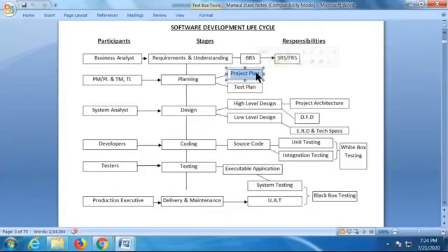Here, what happens in real scenarios? The business analyst will sit with his department and first discuss the project. These are good, experienced fellows. The manager is a very experienced person who knows how the planning should be done. Once you understand the requirements of that project, your manager prepares a plan in an Excel sheet: how much duration we take for developing the project, how many days, how much budget we require, and how many resources we require, like developers and the testing team.